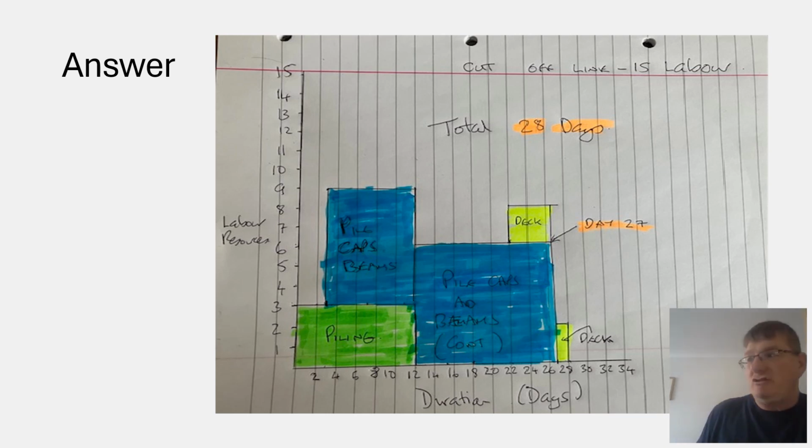It's been manufactured off site, brought onto site, and then once it's brought onto site, it's unloaded using a big crane, because that takes up a lot of physical space. I don't think I can start my decking. The earliest I can start my decking, I think, is 22 days.